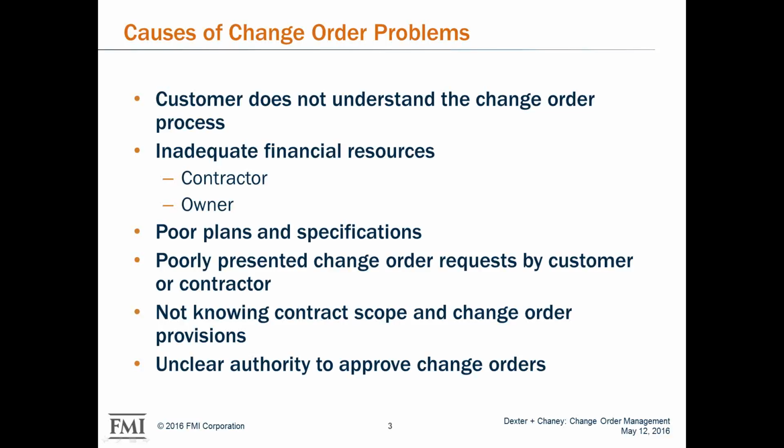Poor plans and specs. A lot of times some of the specs are open for interpretation, and that's not good for anybody. The solution here is, you've got to get those RFIs out. You've got to request clarification. You've got to be proactive about it, and you really need to get all that done in the first 20% of the project. So some of that's on you to get clarification before you get too far in.